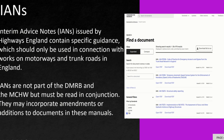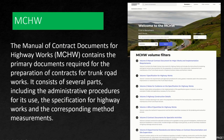The next reference is MCHW — the Manual of Contract Documents for Highway Works. It is mainly used for preparation of contracts for roads. It covers administrative procedures, specifications for highway works, and corresponding methods of measurement. It consists of several volumes, from Volume 0 to Volume 6.